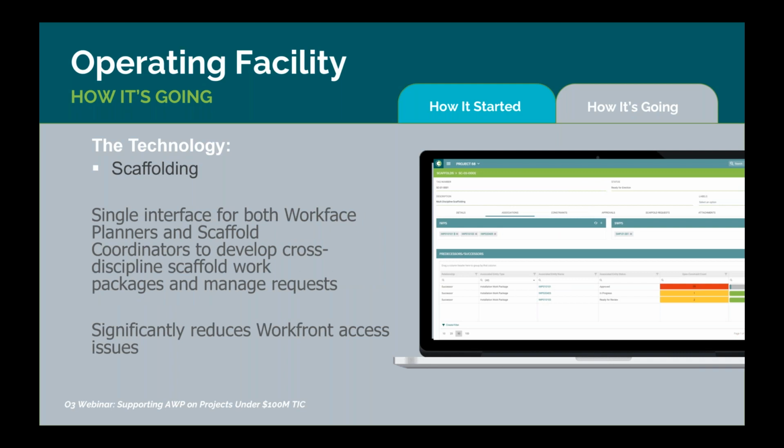With scaffold management features, workplace planners and scaffold coordinators can now work together to manage requests across disciplines and work areas. Having a single source for scaffold requests significantly reduced workfront access issues and avoided the costly habit of erecting and taking scaffold down multiple times within the same area.